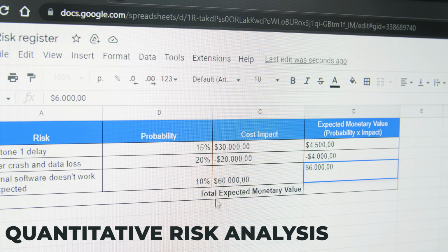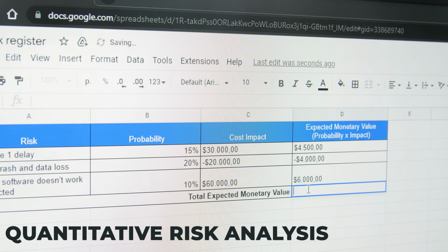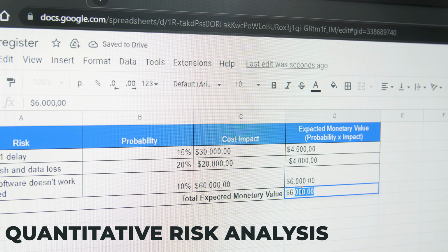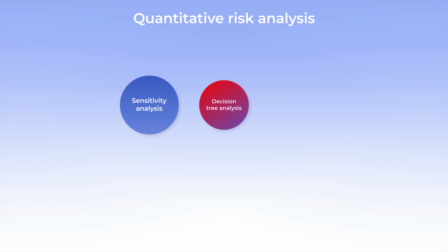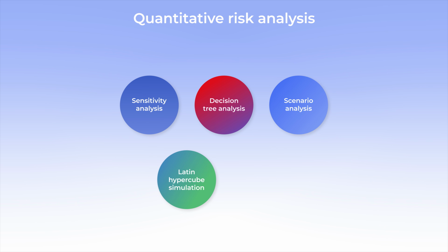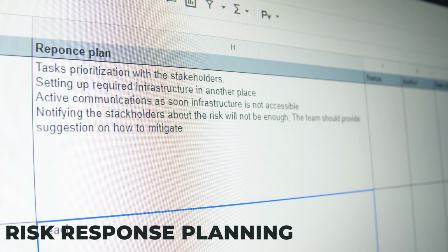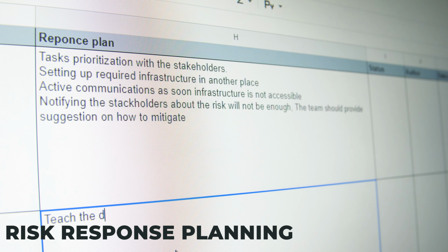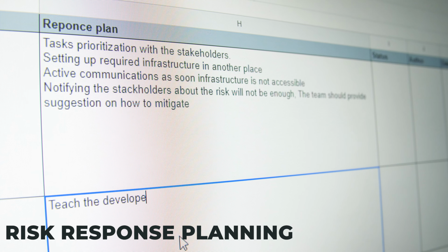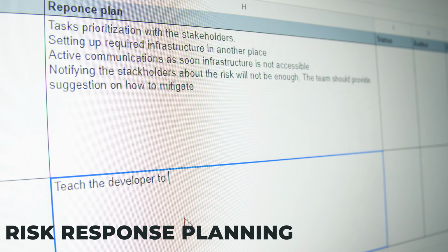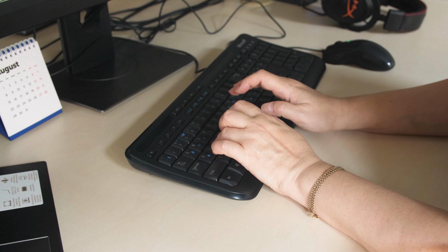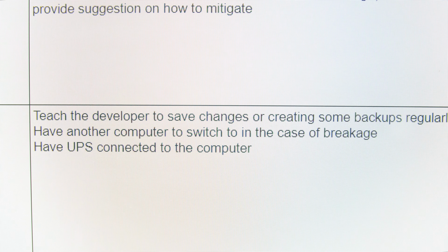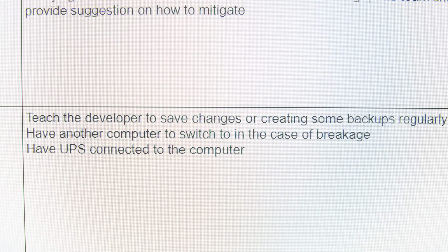Quantitative risk analysis means numerically analyzing the combined effect of identified individual project risks on overall project objectives. At this stage, the project manager assesses risks from the shortlist to support decision-making for risk handling. To plan risk response, the SSA Group project manager and subject matter experts serve as consultants to help risk owners assess options, evaluate the pros and cons, and suggest the most reasonable risk response strategy. The final decision is made by the product owner.